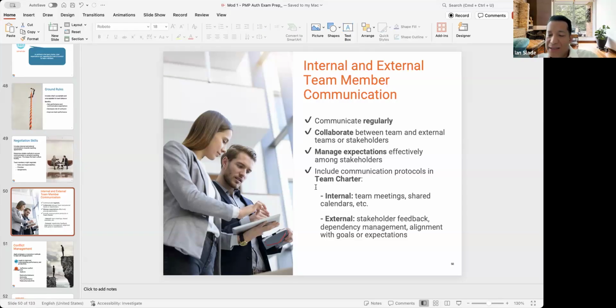They're all on this link. So what the other person has to do is go into your SharePoint link and pull information out, right? So you notifying them is push, them going to the link and getting information is them pulling it. That's the difference between push and pull.